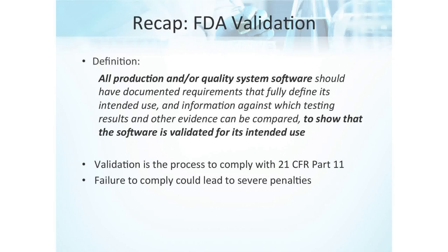Right. And so when I think of validation, it's really asking two basic questions. Number one, has the computer system been built right? And then number two, has the right functionality been built? Which is more of an external perspective, an external user perspective. So validation requires enough information to answer both of those questions, but it's important to understand, what does enough information mean? How do you quantify what's enough information? And this is a judgment call. It will always be a judgment call. You have to have documentation that shows you put your efforts towards your highest risks.